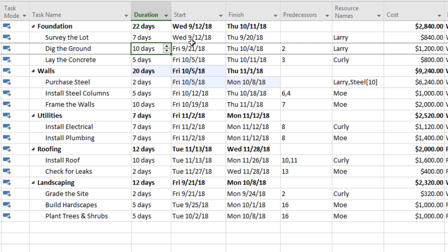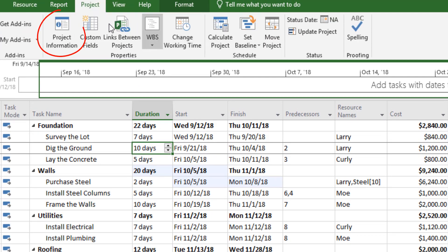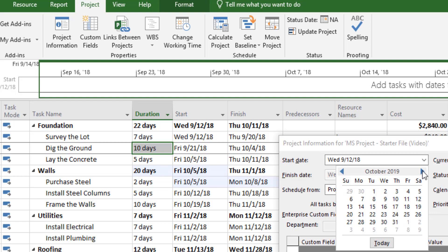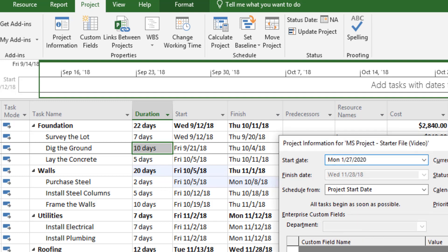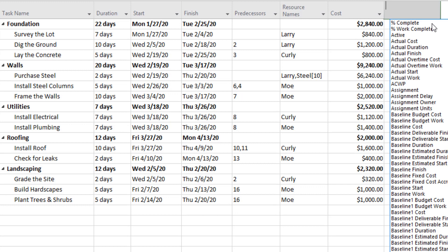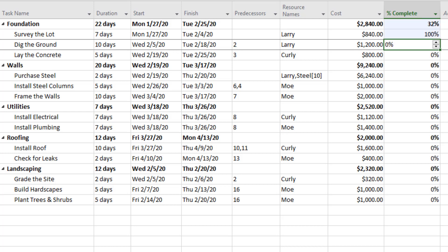I notice the project is currently set to start September 12, 2018, which is over a year and a half ago. I'll go to the Project tab, click Project Information, and change the start date to January 27, 2020. Because predecessors are built in and activities are automatically scheduled, Microsoft Project will adjust all the activity dates appropriately. As the project gets underway, I can also add a percent complete column and use a percentage to designate how much of each activity is finished, so I have an idea of what I'm working on and what's already done.